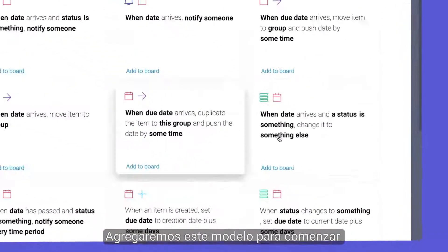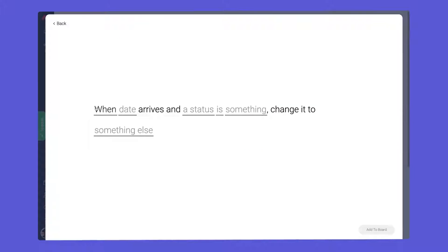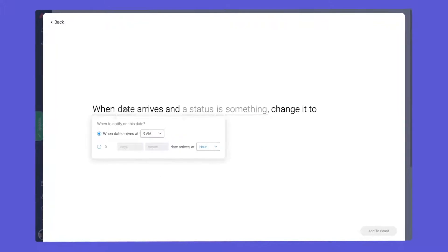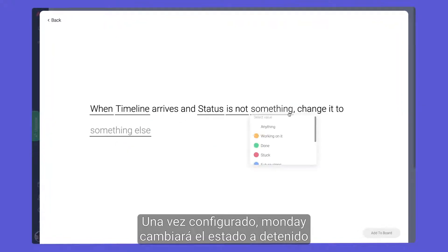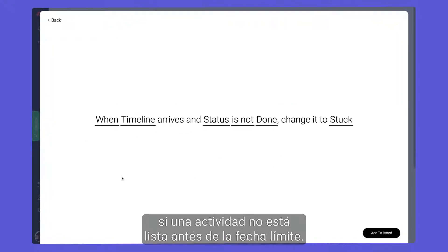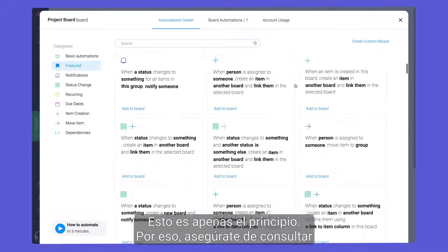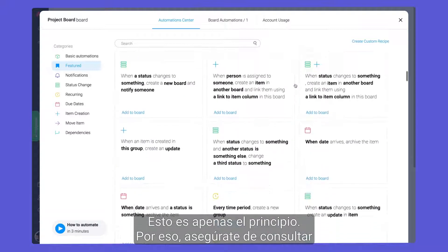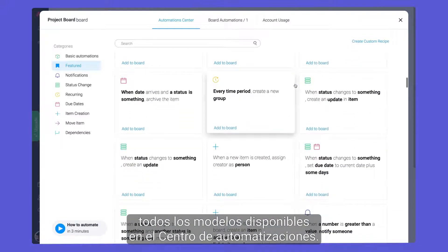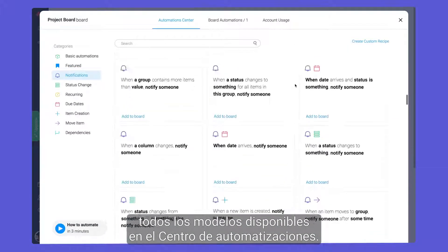We'll start by adding this recipe. Once configured, Monday will change the status to stuck if an activity is not done by the due date. We are just scratching the surface, so be sure to check out the many recipes available in the Automation Center.